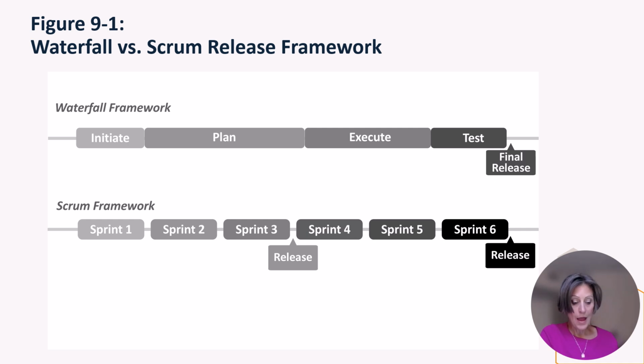Scrum workflow. Agile processes like Scrum use iterations to conduct small phases of work with frequent release of features. Traditional staged and gated NPD processes release a final product at the conclusion of the project, while Agile institutes multiple rollouts. Scrum releases vary from launching an MVP, remember that means minimal viable product, to adding features or correcting bugs. Figure 9.1 shown here compares a generic waterfall process with upfront planning and a full product release of a Scrum project that has multiple incremental releases through the project.